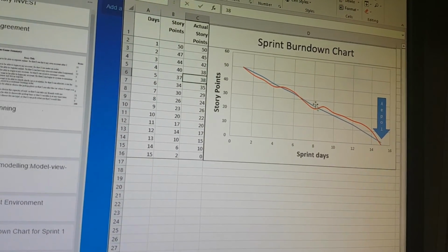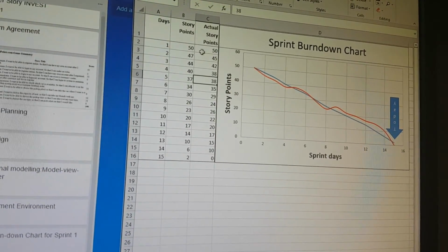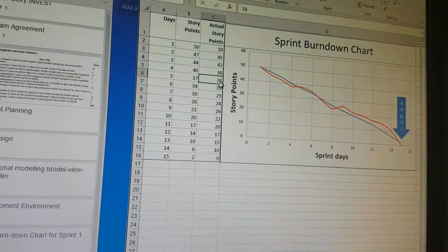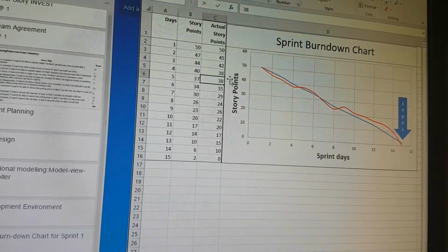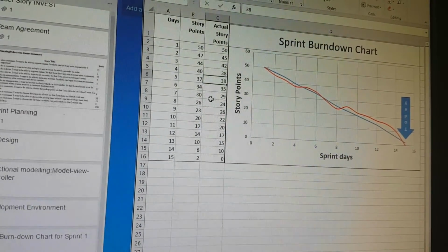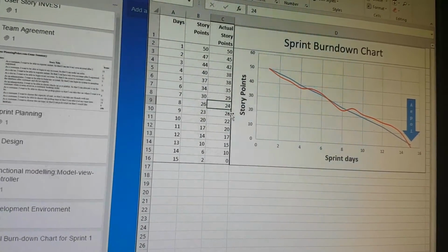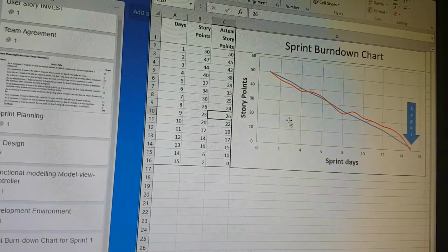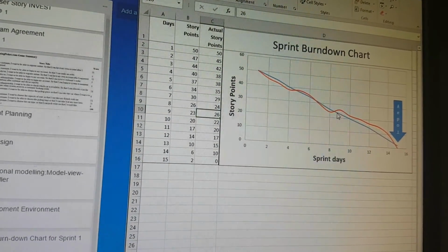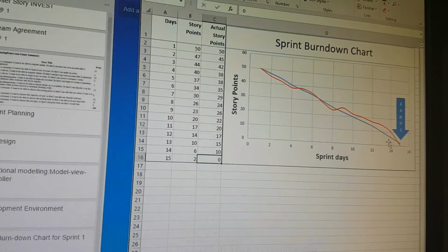This chart shows the developing work in each day, and the red line is the actual. At the beginning, it worked fine and smoothly, and at the end of the first week, we had some problems that needed discussing. So we didn't work on that day, day 5. And at the end of the second week, we found difficult problems that needed to be fixed. So we delayed the work into the third week. But fortunately, we finally finished our sprint 1 work at the end.